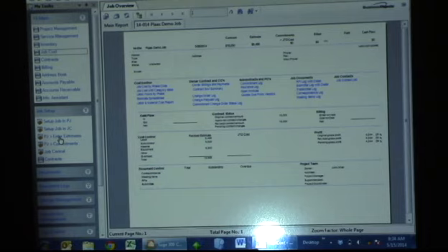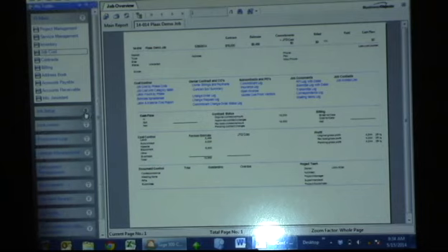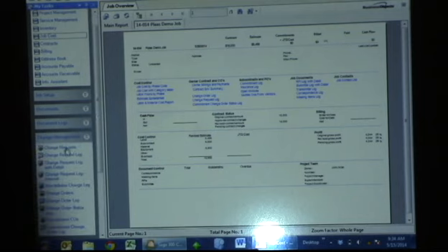So when you're looking at the blank grid, you think, oh, I want this number to be 1300. It will put 1300 in, but if it already has 1500, it's going to add them together. And when you do the internal change, you just go into one of the categories and subtract out. If it's cost code 100, yep, you're going to take 200 away from cost code 100. So now that we have the contract set up, it will let us go into the internal change, so we can do that now.